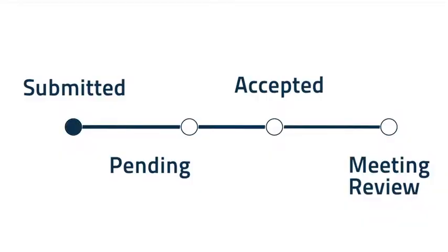Once the change initiator has completed the change, the status should be changed to submitted and then saved. This moves the change into the pending status. This will send the RFC to the assignee's manager. The manager must then accept the change to be included in the regular change meeting for official approval.